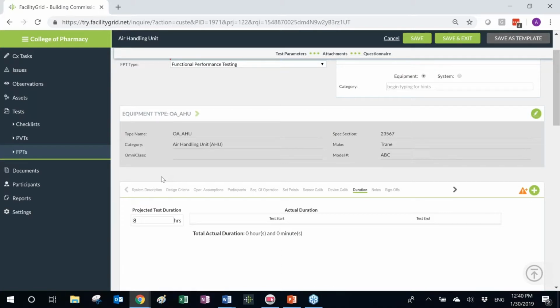So again, instead of the general contractor's construction manager chasing you for this information, the general contractor can simply use this information to plan their functional testing activities in the construction schedule.